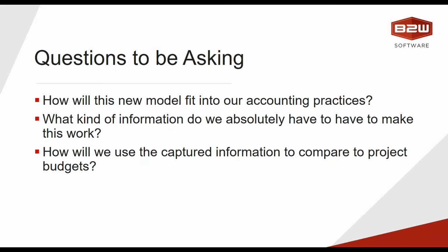If we don't understand the difference between what we do for concrete paving and what we do for asphalt paving and which one makes us more money, then this whole thing was a bust. Then that's a good place to start, where you're going to create a distinction. I'm going to have a category for concrete. I'm going to have a category for asphalt. And then how do you plan to use that information that you gather to compare it to what you're doing in your projects? How is that going to help you improve how you're working your jobs in the day-to-day? And then when you're looking at it over a broader stream, what kind of lessons are you going to get out of it to move forward with?